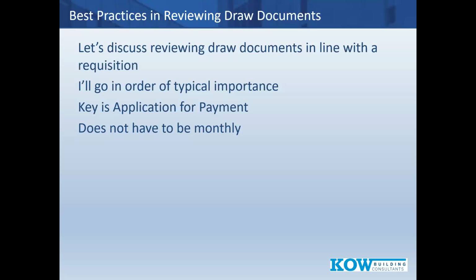And then in or about the first week of the next month, you'll get paid. So that monthly cycle sets the table for everything we do. It's a monthly central or master requisition, which is built upon monthly subcontractor requisitions. Again, I'm broad brushing it.